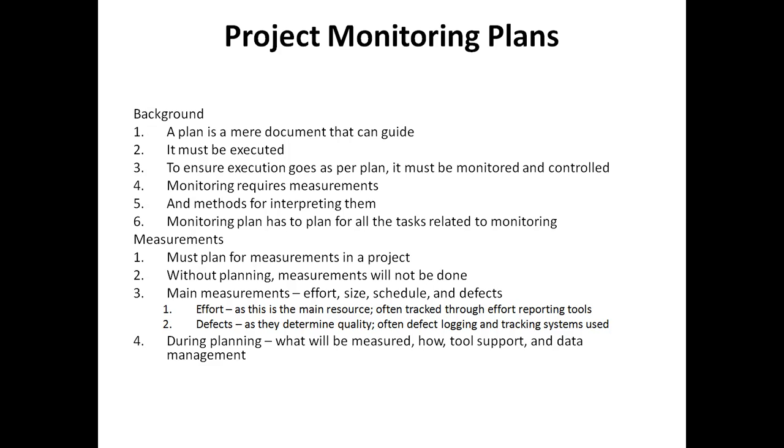The monitoring requires measurements to be made to assess the situation of a project. If the measurements are to be taken during project execution, then we must plan carefully regarding what to measure, when to measure, and how to measure. So, measurement planning is a key element in project planning.